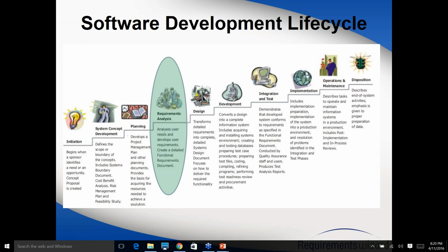What is the cost of building this system versus the benefit the company will receive in terms of implementing the system? It can be tangible benefits, it can be intangible. Tangible means in solid numbers. Okay, the company will reduce the cost by, let's suppose, 20% operating cost. The company will improve its revenue by 15%. We expect the profit to go up by 4 million per quarter. That's tangible, right? Based on hard numbers.